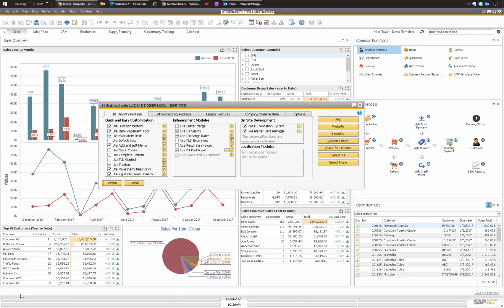It's no problem. Just be aware that if you do that in the middle of the day, it will kick everything off. Your Project connections, it will kick all users, and it could cause issues. I've never seen it cause direct corruption per se, but just best practice, remember to wait till after hours, kick everybody off, or if you can coordinate the day, you could do that too, but generally wait till after hours.